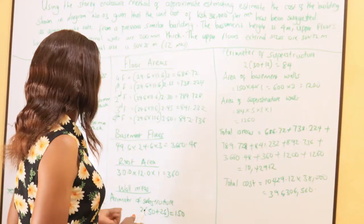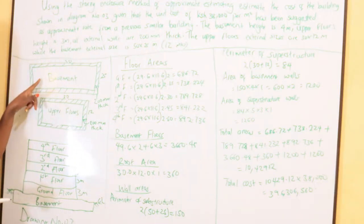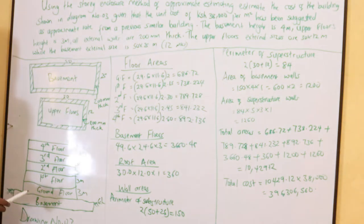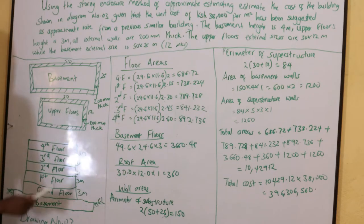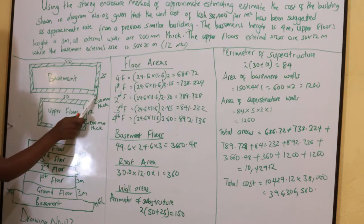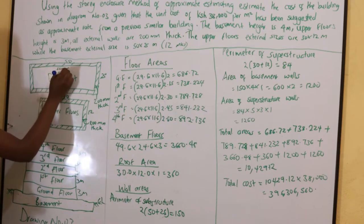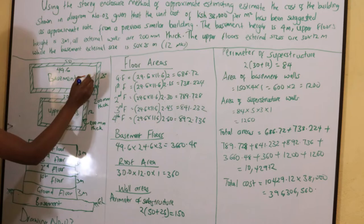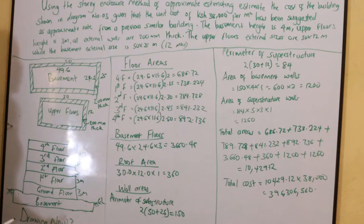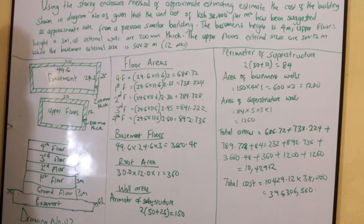For the basement floors, the external dimensions are 50 by 25 meters. Deducting 400 millimeters for wall thickness gives internal dimensions of 49.6 by 24.6 meters. The basement floor area is 49.6 times 24.6, weighted by a factor of 3, giving 3,616.48 square meters.